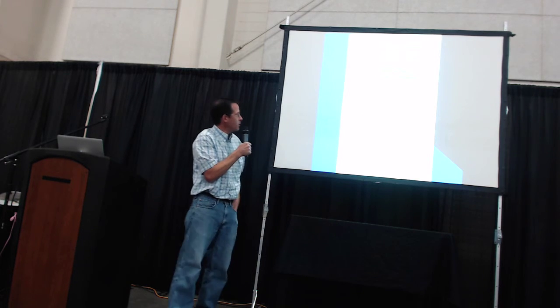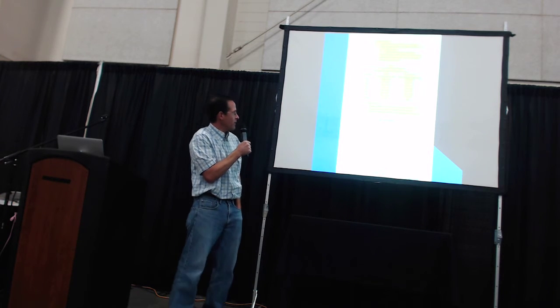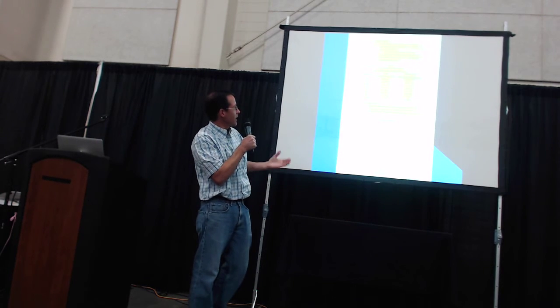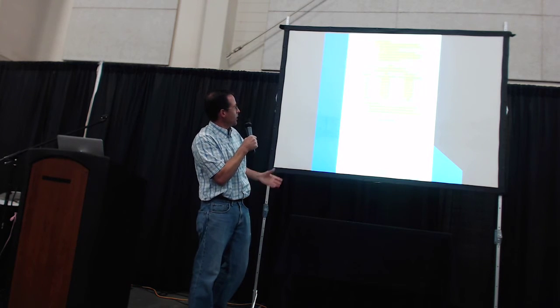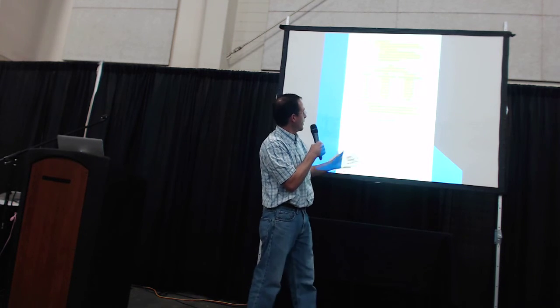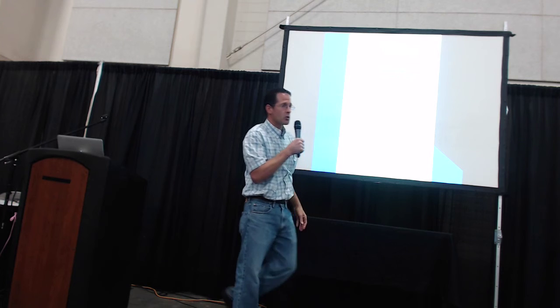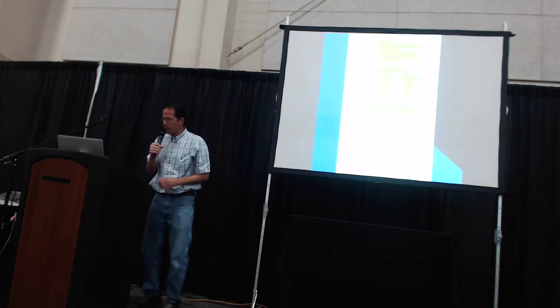So the department will apply pay factors to each pile individually based on the total measured pile length from the specified cutoff elevation, and apply only the criteria with the lowest pay factor for any one pile. So if one pile is 9 inches out and the plumb is 2.9%, then the 9 inches out of location is what will govern, because it has the stronger penalty, and so that's the only one that is applied to that pile.